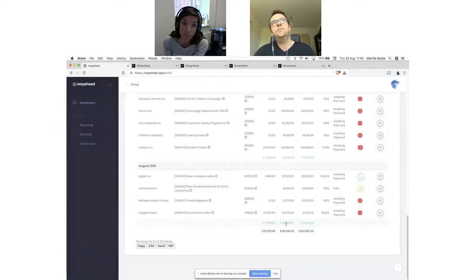Well, I had this discussion with a lot of people back in the Streamtime days. The difficulty is you want to associate a cost. If you purchase printing from a supplier and you invoice it onto a client, it's pretty straightforward. You can associate a cost with an invoice. But there's a lot of costs that don't get billed out to the client directly. You might hire a freelancer but sell design to the client. You might have travel expenses but not bill them literally as travel expenses; they might just be soaked up into something else. And then there's advances on advance invoices, and so many different exceptions.